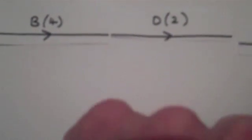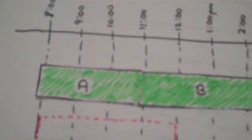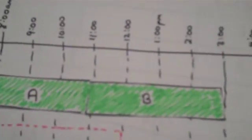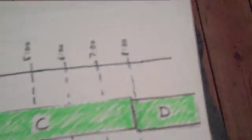I could switch D and C around as long as both happen after A and B. That's how long it would take one person. Here's a timeline — a different way of showing it. There's task A and B, then task C, and then task D. If I started at 8 in the morning, it would take me till 10 at night.